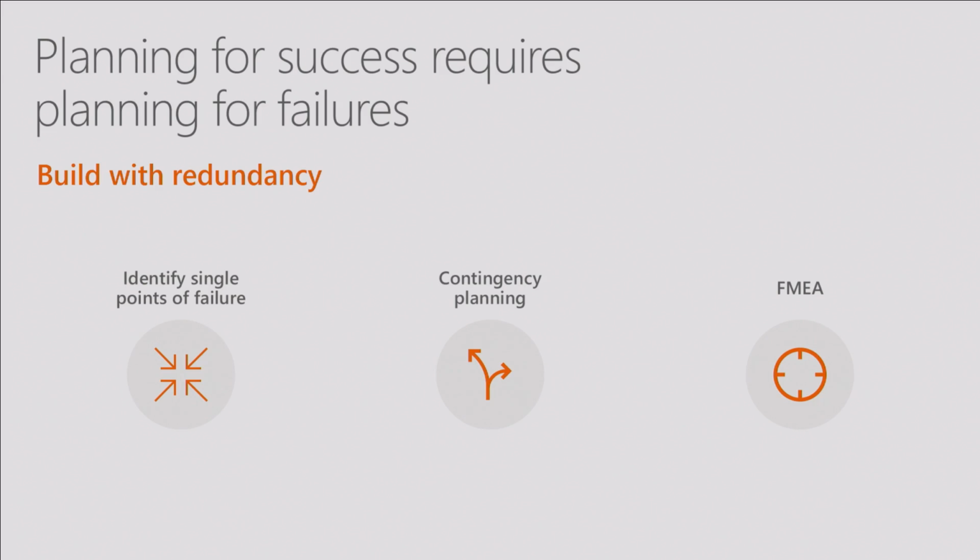Again, contingency planning is huge. We actually do checklists for our major events that list major risks that we've identified, and say, hey, this is something that we think might be prone to failure. If that happens, how do we handle it? And one of the things you always have to plan for is simply the worst case scenario, that somehow nothing works and you're dead in the water. And you always have to say, okay, well, what are we going to do? Are we going to message to people that they should come back and watch it on demand because we're still recording it? Or do we say, hey, we're going to reschedule it? Or whatever you need to do, but plan for every type of failure you can think of.